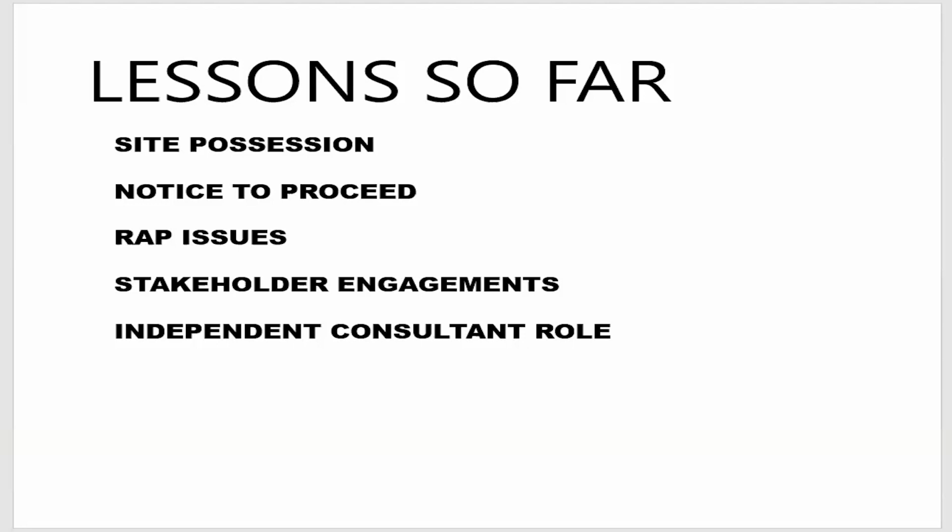And invariably, it is being back and forth, because whilst the design of the contracting entity is to maximize its profit, the client is checking the design to ensure the longevity of the road. So it comes and you return that you are not meeting the design standard, the SIL laws are not meeting. And it's been back and forth in some sections, and this is affecting the notice to proceed. It's a big one that we have to resolve, the RAP issues.